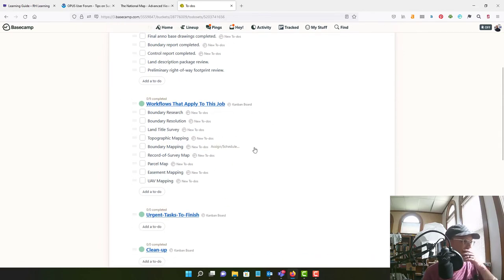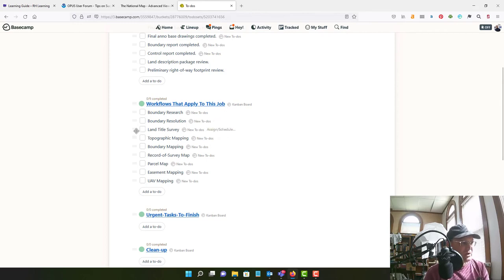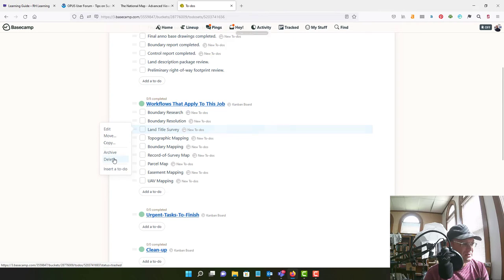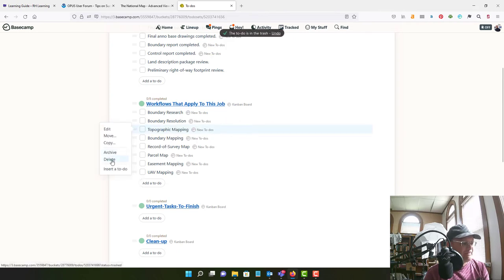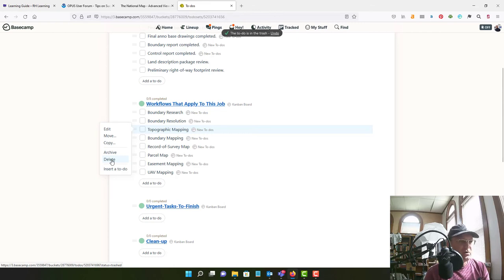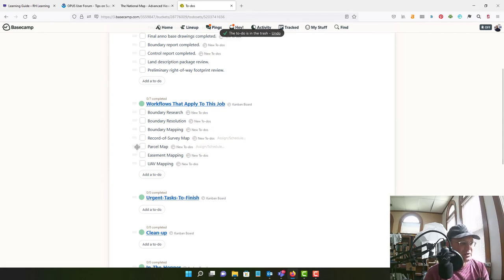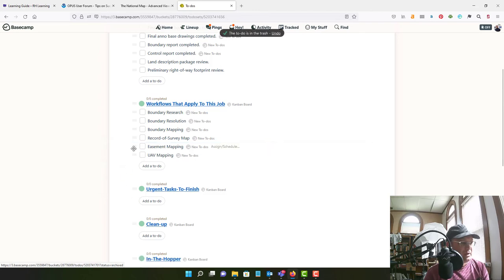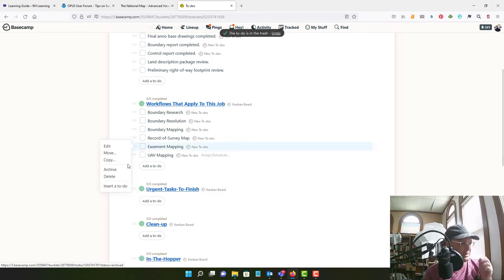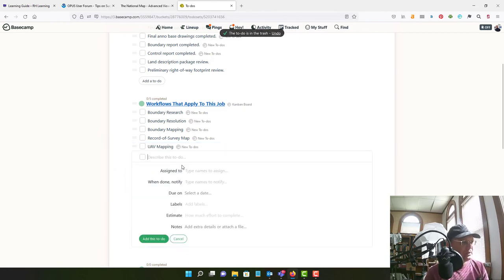We want to do the same thing for our workflows. So we are going to need boundary research, boundary resolution. We are not doing a land title survey so I can delete this. We are not doing, let me think about this. We're going to do a UAV ortho. I don't know that we're going to do topo mapping so I'm going to take it out for now. We are going to do boundary mapping. We will have a record survey map. We aren't doing a parcel map. We're probably not mapping easements on this one. We will do UAV mapping.